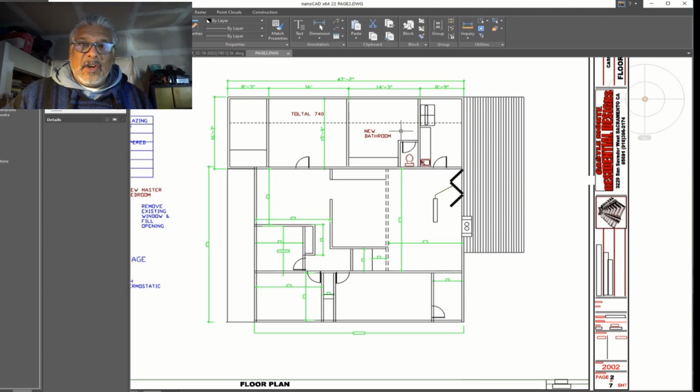Now, all this construction that was done is kind of hokey because the floor is at different heights. They used the existing foundation of the garage, and then they built up a block foundation for the new pantry area and washroom. And my plan is to demolish that whole area, take it down, take the foundation out, everything gone, and start over.